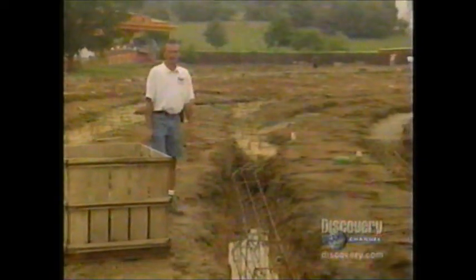Because of the rain, we had to pull the rebar back out of this ditch again, re-dredge it, and take 6 to 12 inches, probably, out of the bottom, to find a good hard surface again. And then we'll have to relocate the rebar back in there and then pour it. So we've lost a few days because of this.